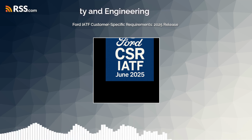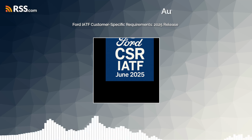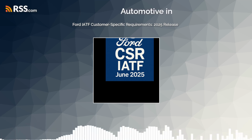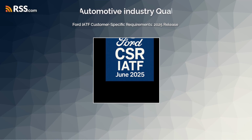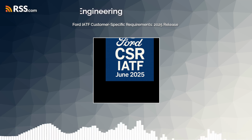Full PPAP approval will not be granted if the part or process is currently flagged with a WERS alert indicating an ongoing issue. Can't approve if there's an existing problem. Right. And for changes to service unique parts, there's a specific SREA process via FCSD, Ford Customer Service Division. Okay.